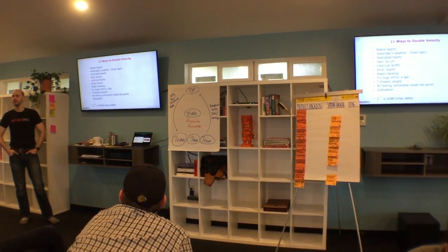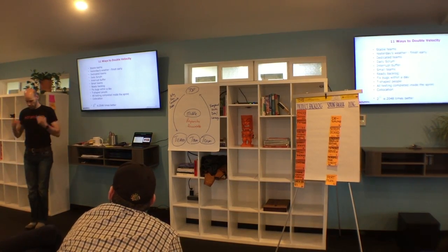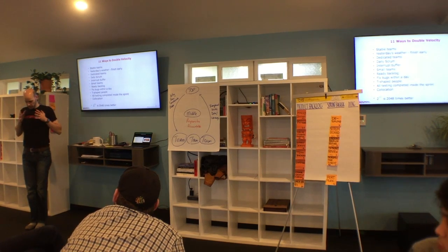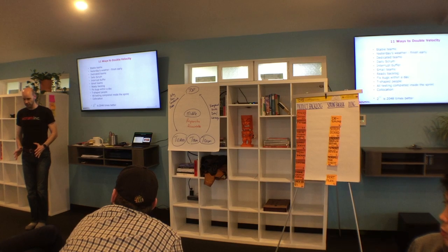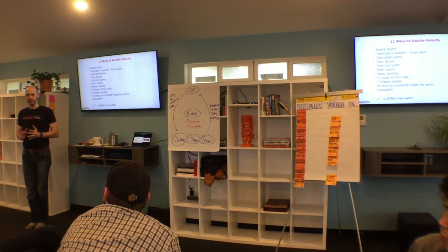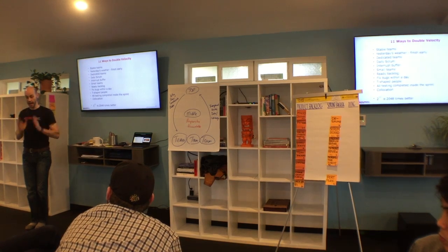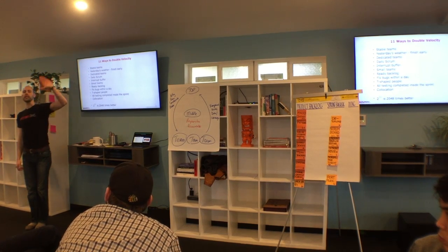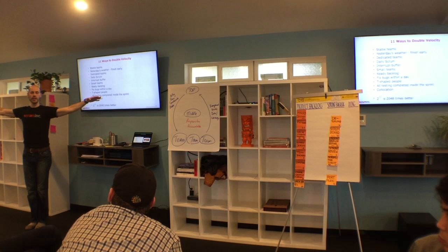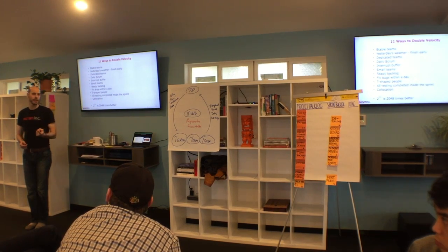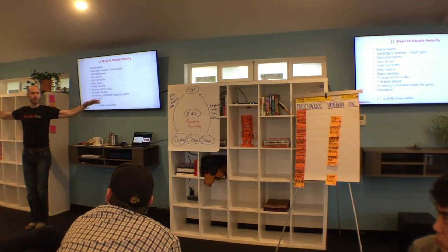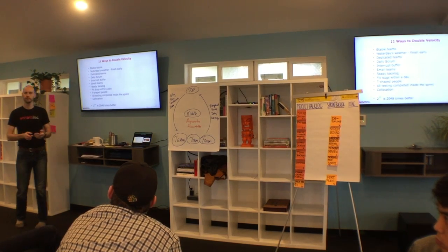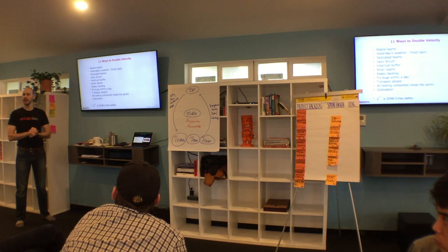Are there questions about any of the items on this list, especially for the newer folks in the room? T-shaped. Yeah, glad you asked. So an I-shaped person would be someone with a deep skill in one discipline. They may even be a PhD, but in any case, they're very skilled in one area. A T-shaped person is someone who has a deep skill and continually tries to grow deeper in a skill. They're professionally passionate, but they're interested in helping in at least 2 other areas. A team of T-shaped people is robust. Any one person can get sick. They're collaborative. They can help each other in their work. Everyone can at least pair, if not even swarm. It's much faster.